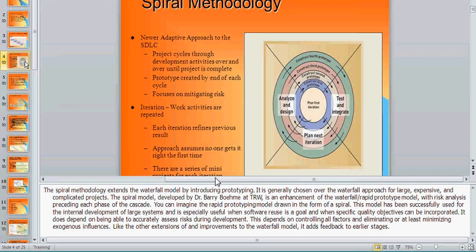You can do release 2. You still have that scheduled. Do you think you can add his request to your release 2? Yes. Right? So you can incorporate change even without going through a change request process, right? Change management process. Yes or no?